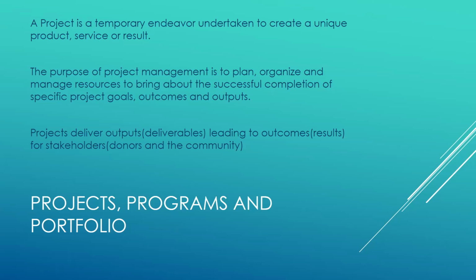And another thing that we had not talked about here briefly, I would like to touch on activities as well. So your activities are components, elements in your projects. For example, a particular project could have up to, say, 4 activities. So we say that we've taken on this project to train a number of women. The activities could range from, on this day, we're training them on this particular skill. Today we're taking soft skills, tomorrow we're doing the practical classes. So you have a range of activities under a project, and the range of activities make the project. And interlinked projects make programs. So it's very, very important to note these things when we're working on our projects.